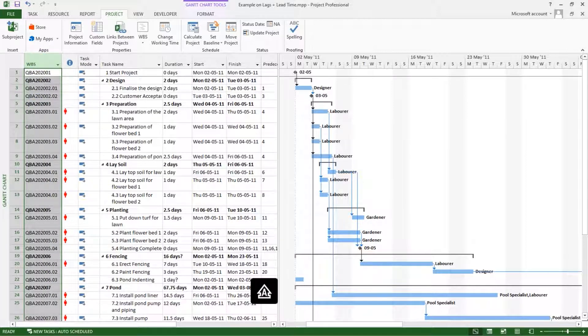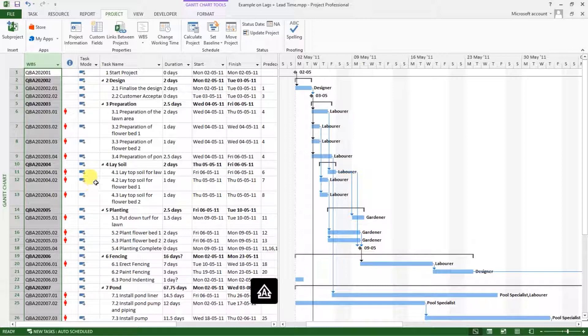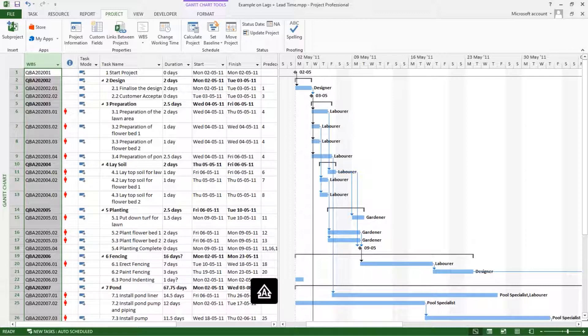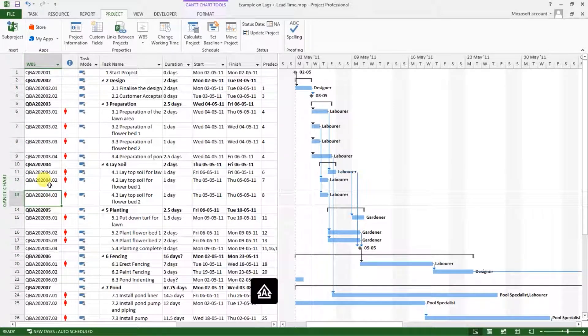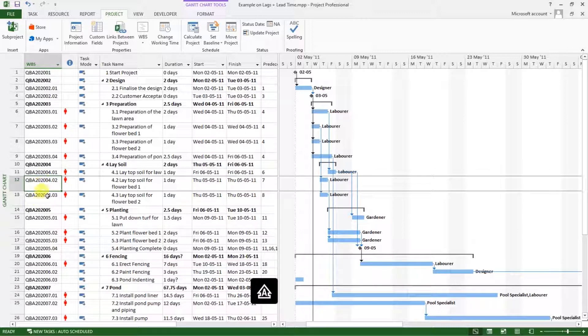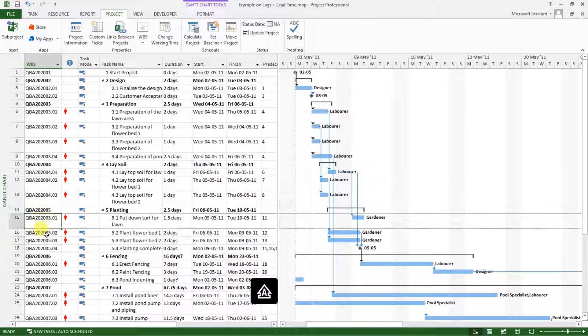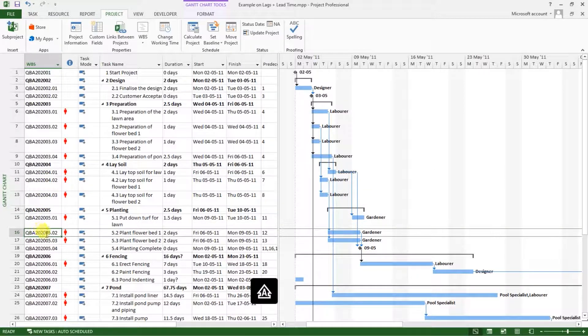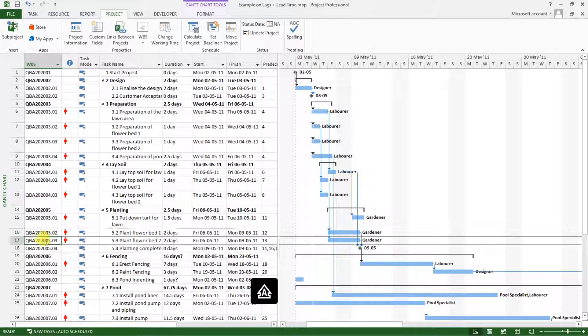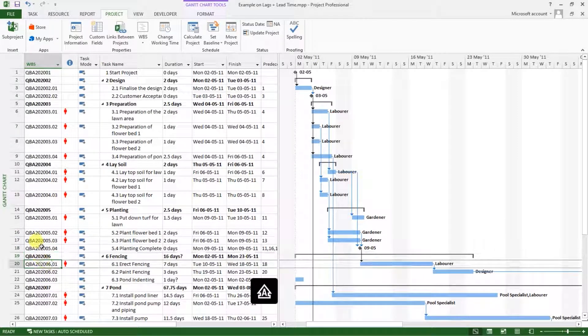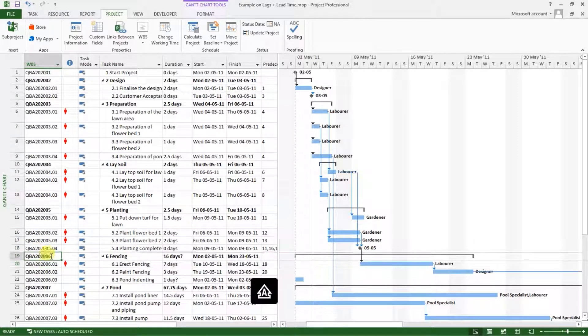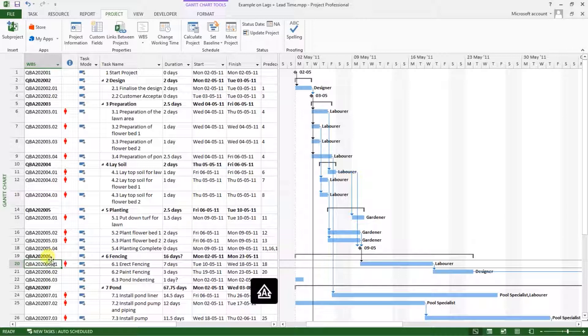As you can see, we've been able to do a WBS numbering system for our project. And every task now has a unique identifying code that is related to our project and is related to the numbering systems that we use for our offices.